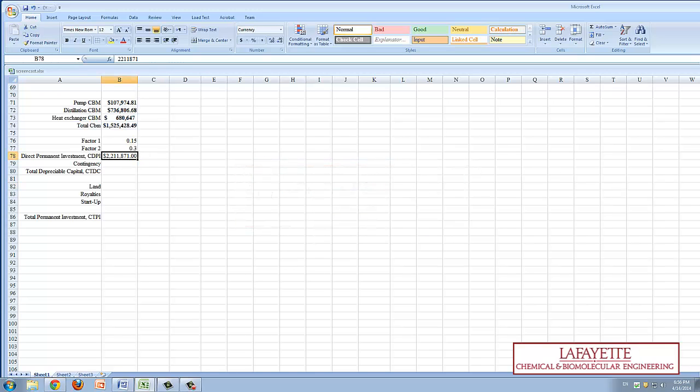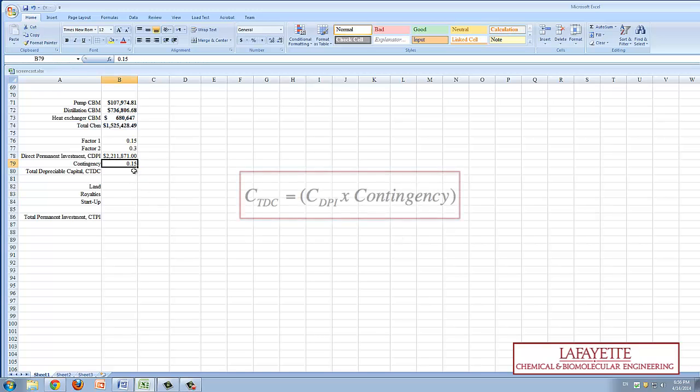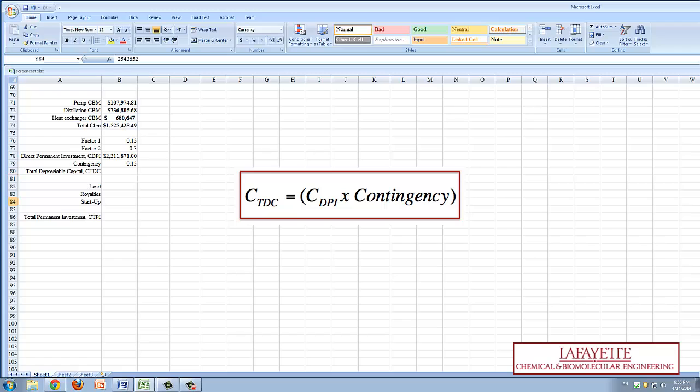According to the literature, 15% of the CDPI should be set aside for contingency purposes. The value of the total depreciable capital, from the equation shown, takes into account this contingency.